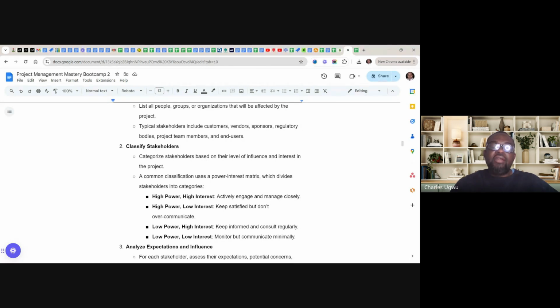You know, these kind of people are regulators. Like this are where the regulatory bodies come in. I will use local government authority or other regulatory agencies. If you want to build any project, for instance, in local government, you need to get a permit before you can do any PIM.